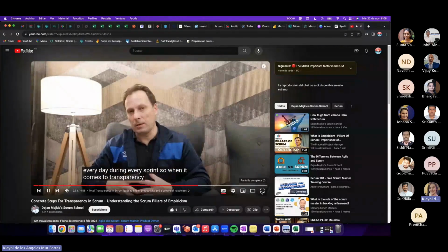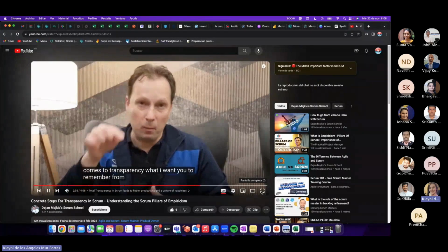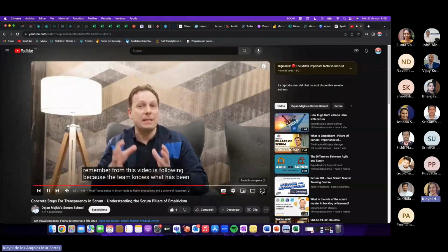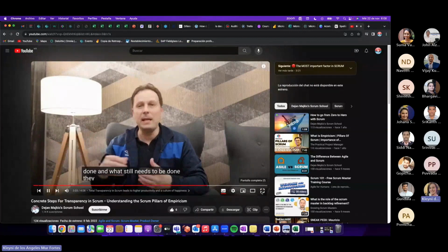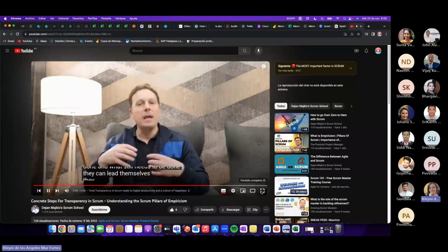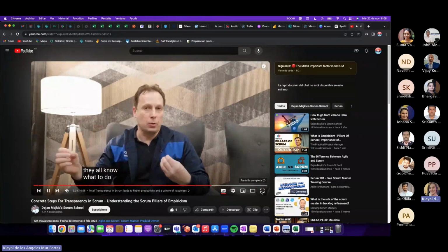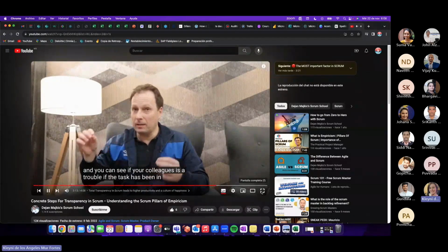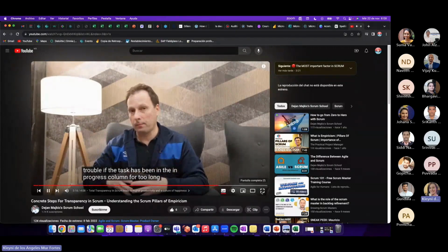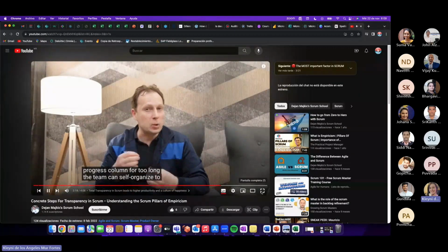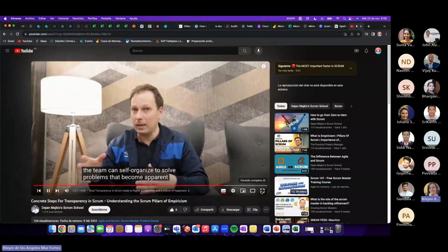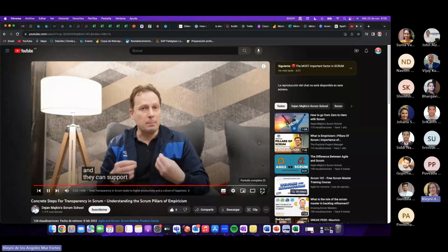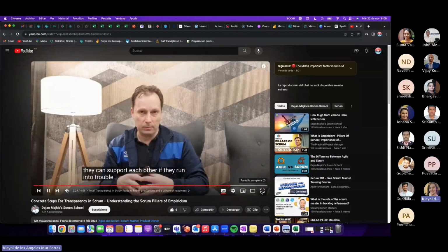So when it comes to transparency, what I want you to remember from this video is the following. Because the team knows what has been done and what still needs to be done, they can lead themselves. They all know what to do. And you can see if your colleague is in trouble if a task has been in the in progress column for too long. The team can self-organize to solve problems that become apparent when the whole process is transparent. And they can support each other if they run into trouble.